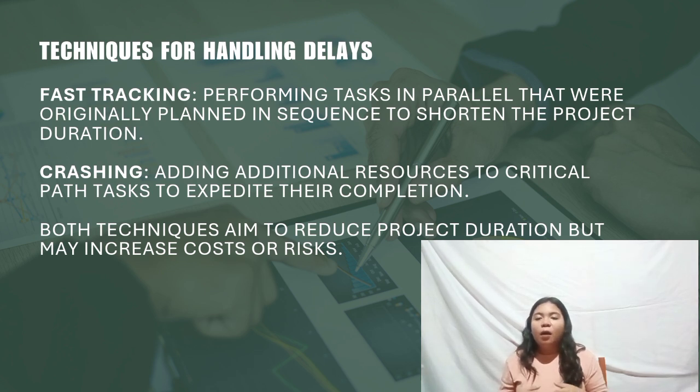But again, there are also pros and cons. The pros are that it directly reduces time on critical path activities and can be effective if additional resources are available. The cons are increased project costs and the risk of diminishing returns or reduced efficiency.